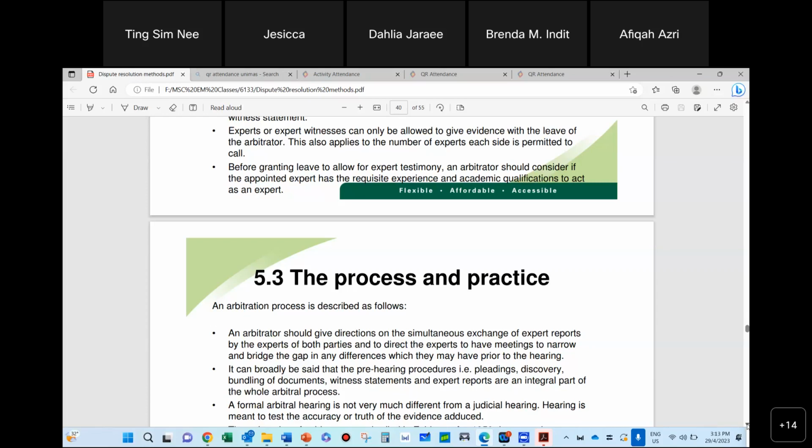And with that arbitration, because you can choose your own arbitrators, they can set up their own formal process, and then you can do it at a common ground. Common ground, like I said, you can do it in Singapore. And then in Singapore, you can use the rules in Singapore, you can use an arbitrator in Singapore. You can use an arbitrator from any part of the world, if you want to, as long as you both agree on which arbitrator to go for.